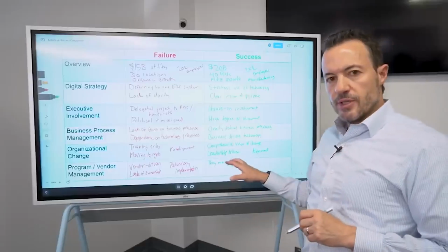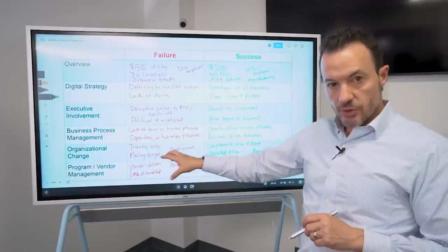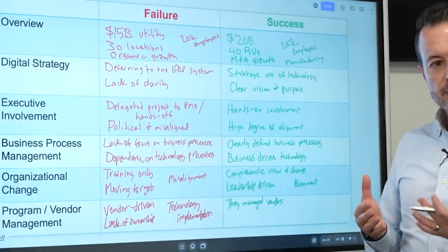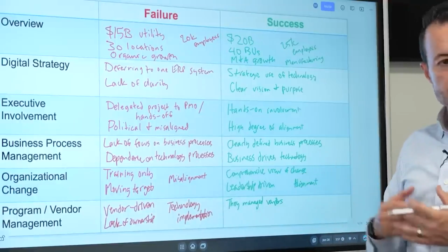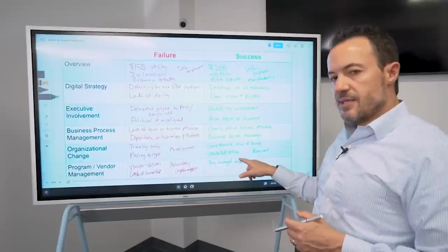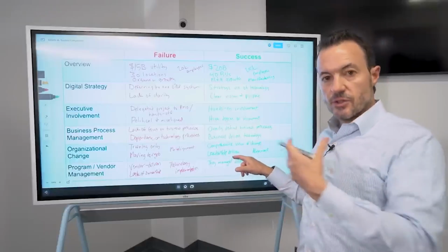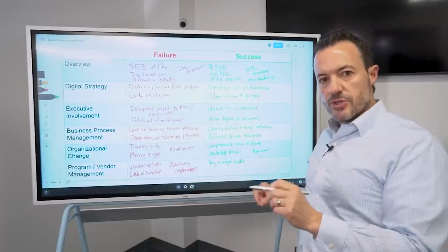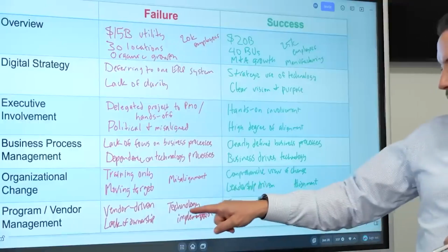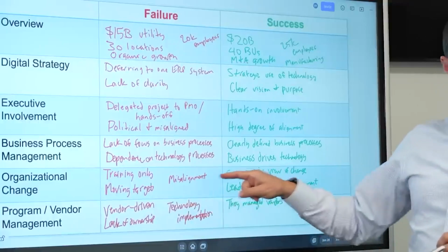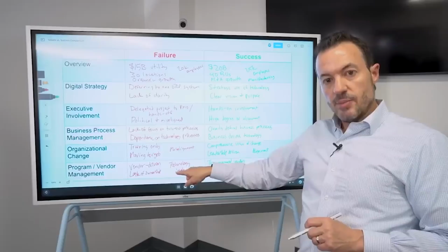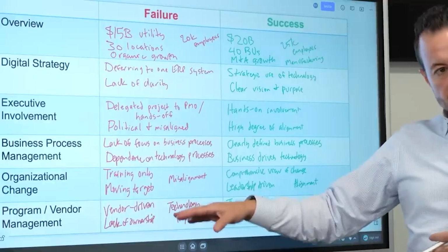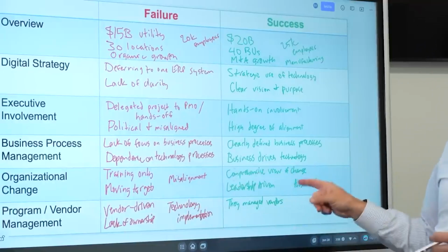This is a really important unhealthy dynamic that you typically see in other cases that you did not see here, which is most organizations, because they're not the experts, feel like they have to defer to the software vendors and the experts, the outside experts. In this case, they did leverage experts, including Third Stage and including the technology vendors, but they knew exactly how to manage those resources and those experts. They did not allow the project to get out of control, and it did not turn into an open checkbook as it did over here, because over here, the vendors were managing the project, and there's a lot of things happening within the project that benefited the vendor but did not benefit the client. That was not the case over here.